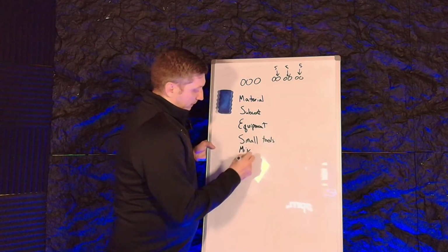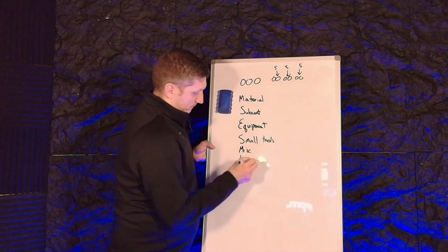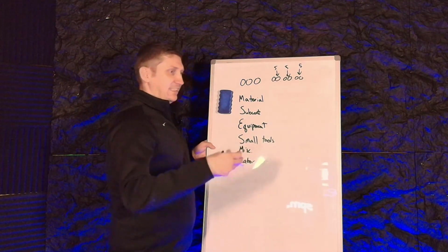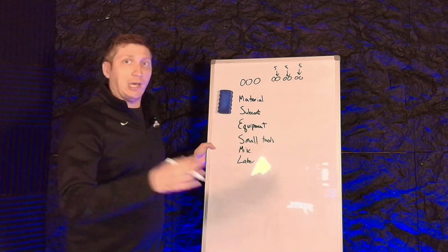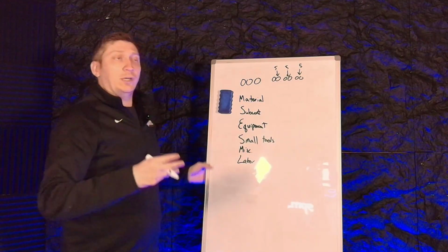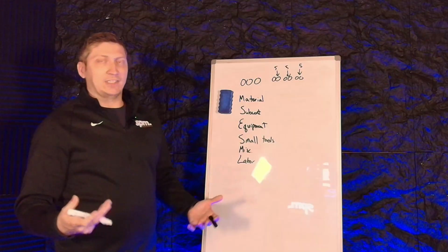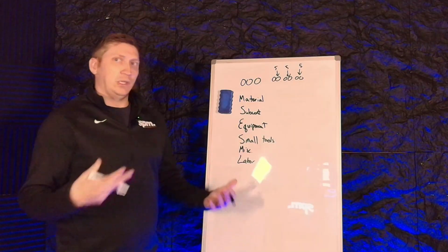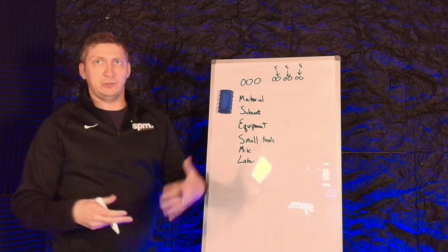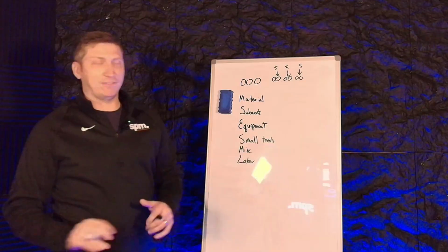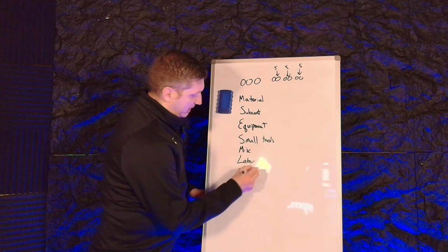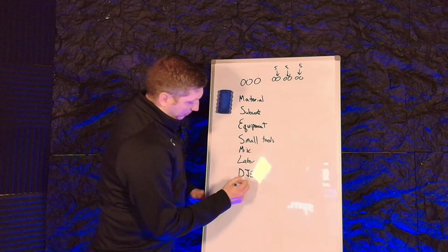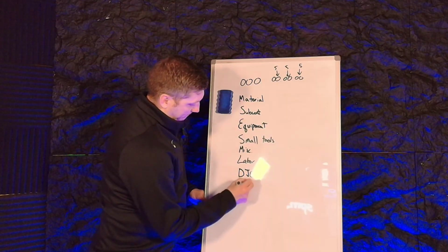We are going to have labor. And this is actually the labor it takes to do the thing, not just anybody that puts a time to a job. Like an estimator or a superintendent, they're not actually building anything. They're just part of the job to do the other parts, the ancillary parts we have to do. And then we get into direct job expense, DJE. And then we have general conditions.